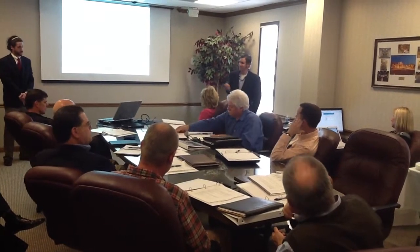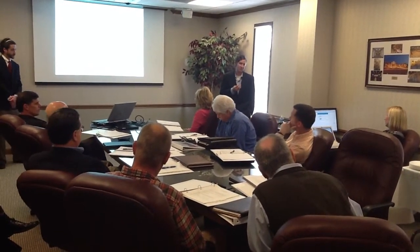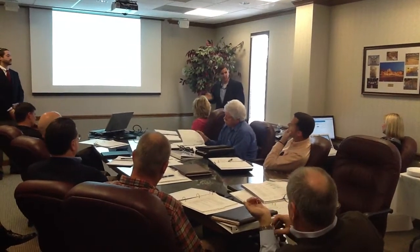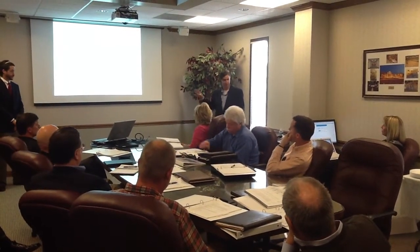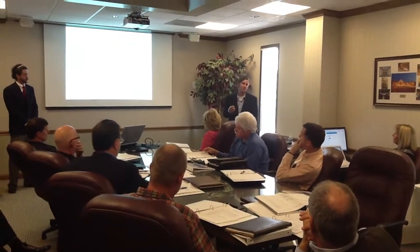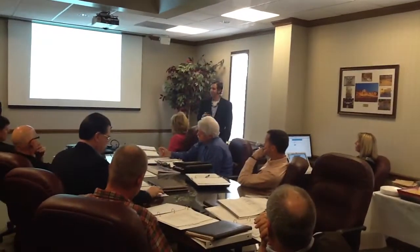Throughout the project, my superintendent and I are going to work together, and we're going to have project engineers. Hopefully, we can work with MTSU to get some interns so they can gain more knowledge. We're going to be giving these people the plans. They're going to have different sections of the project that they're going to look at. They're going to be responsible for just that area of the plant. So if you have a grid or a column line, one student or one individual will have just that MEP section. Another student will have just the landscaping around one side of the building. He'll be responsible for that. We're bringing that to me on a daily or probably a weekly basis, and we'll always be relying on our personnel to provide us with the quality, and it goes back to our team. We handpick everybody, and we're serious about providing a quality product.